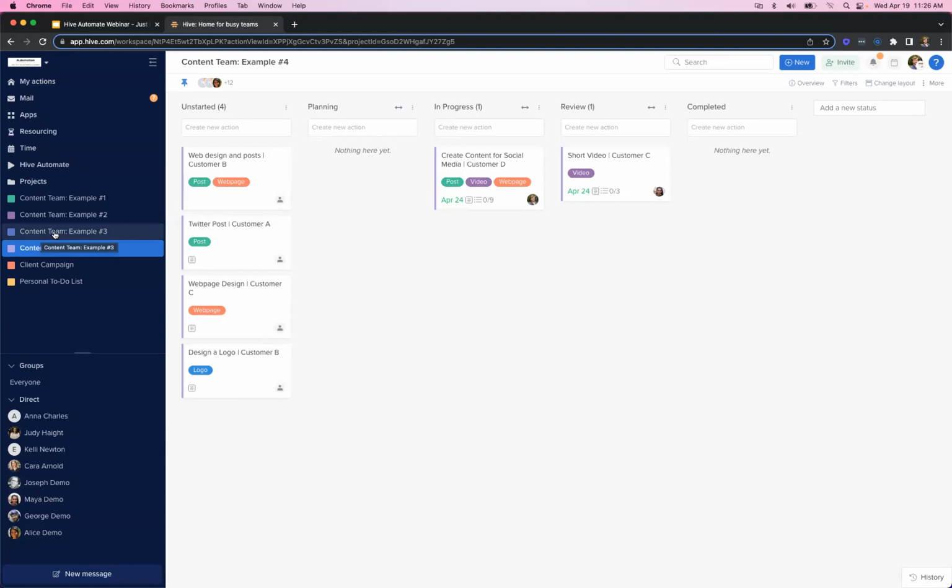We can also move the cards along within the project based on the completion of subactions, so that once one section of the work is done, the next can begin and be automatically assigned out as the previous examples, as well as we can accommodate for one recipe listening across multiple projects using placeholders to dynamically set the role that needs to accomplish that work, as well as take into account form submissions, intake processes, labels for specific types of requests, and dynamically build those cards out as you move along through the process.